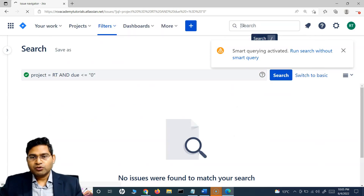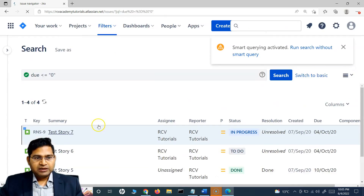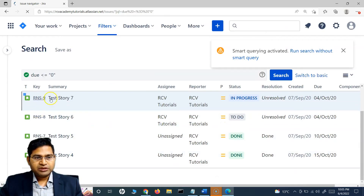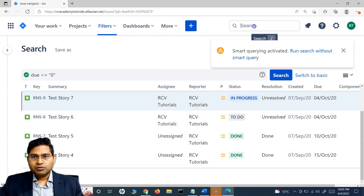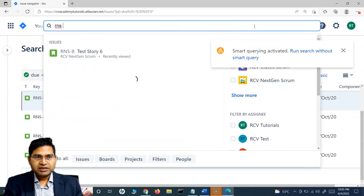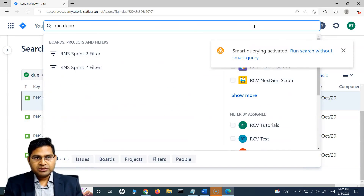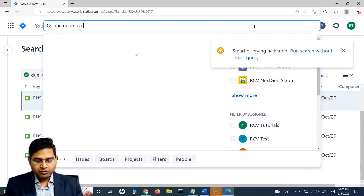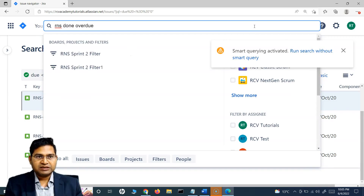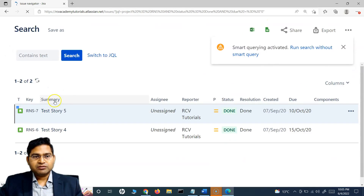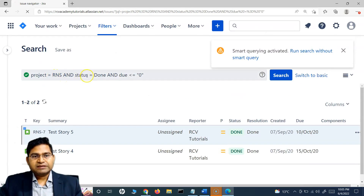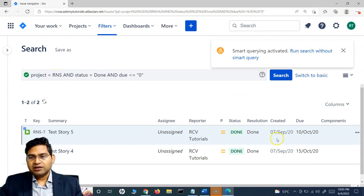Searching all overdue issues, I can see there are overdue issues in the RNS project. I can filter based on status — say RNS, then done, and then overdue — to see which issues have been marked as done but were overdue. So the project key, status done, and overdue are combined in the query.